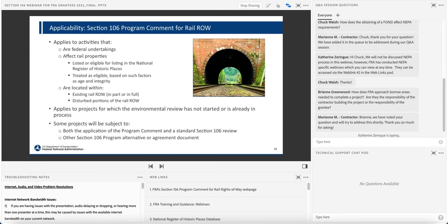If your property has never been evaluated for the National Register of Historic Places and it's suspected to be 45 years or older, it may be a time-saving measure to assume the property is historic, but the project sponsor may be required to follow certain conditions, such as the use of in-kind materials or using Secretary of Interior qualified personnel when you're handling your project. We'll have more on that when we discuss the Secretary of Interior qualified professional later on in the presentation.